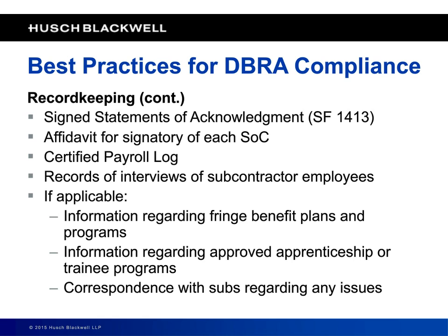To the extent that the subs or your own organization satisfies fringe benefit requirements by providing health care or 401k contributions, you have documentation showing what the program is, so you can demonstrate compliance that the fringe benefit rates are being properly paid, to the extent that the employees are not choosing to receive cash in lieu of fringe benefits.